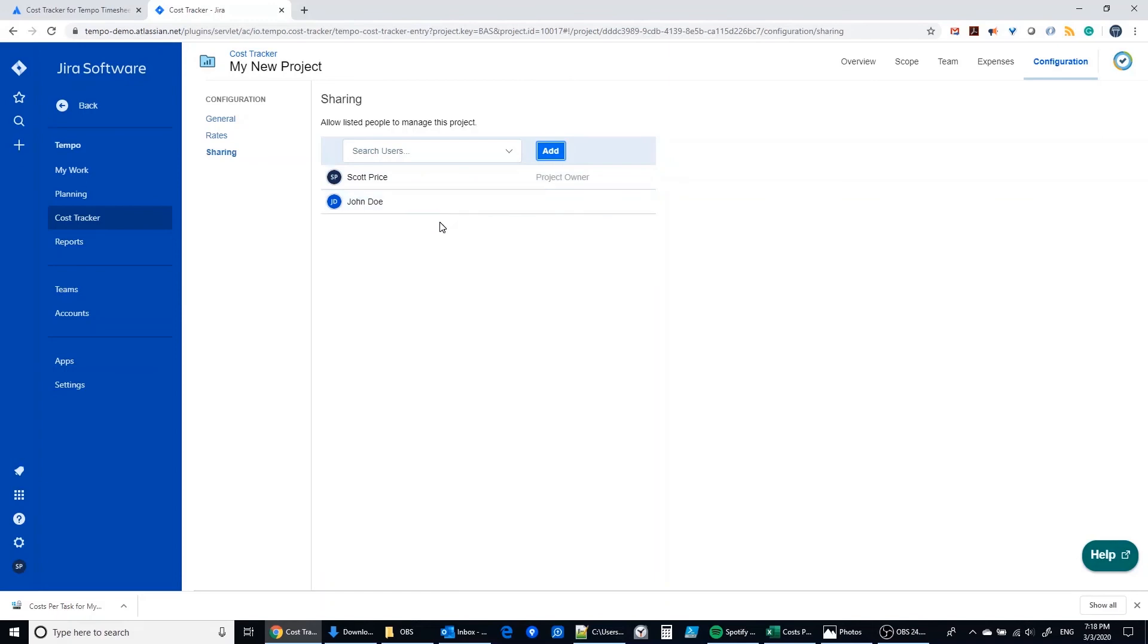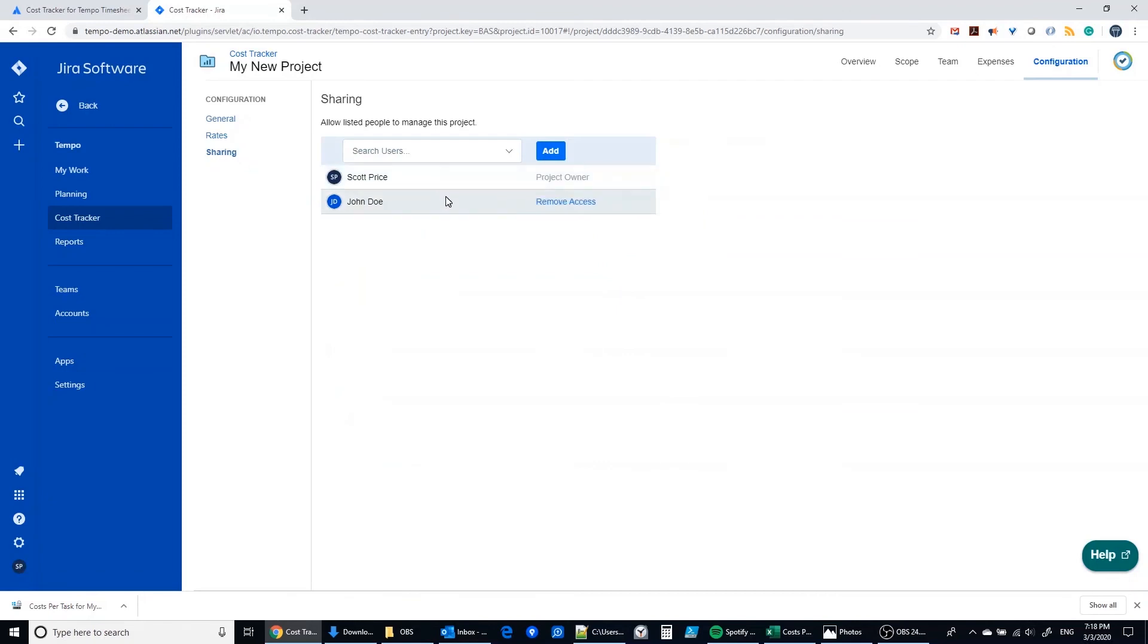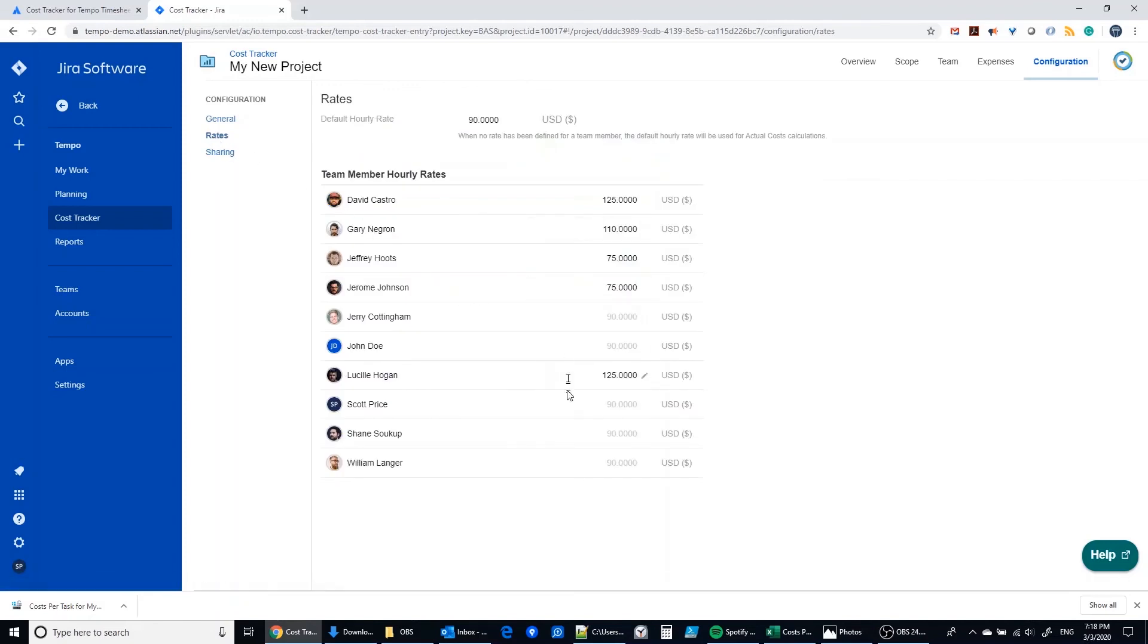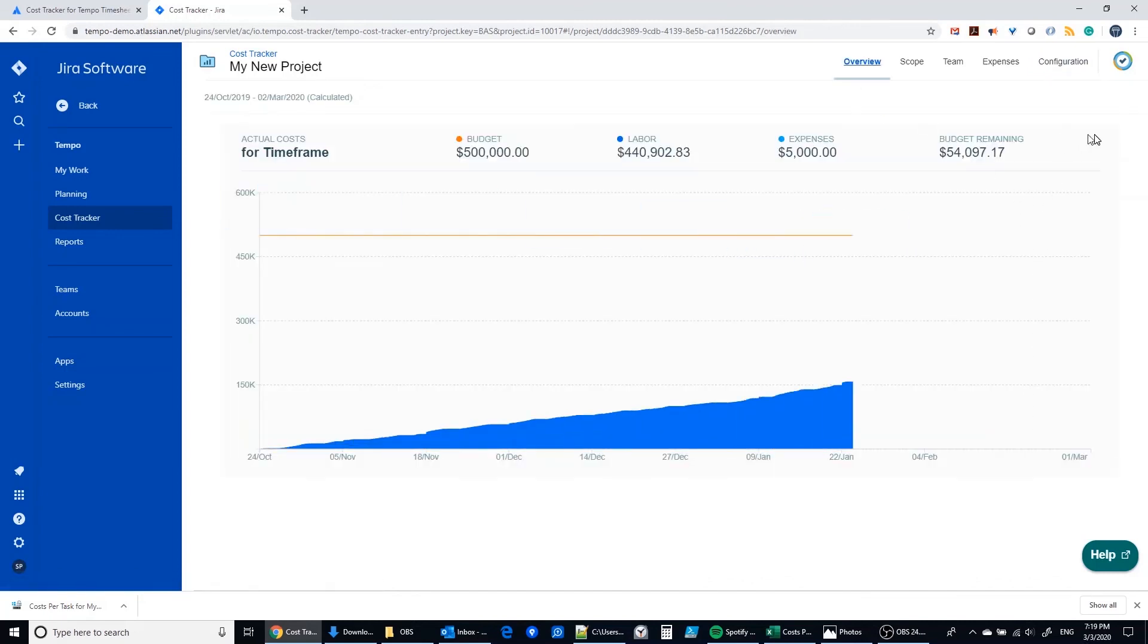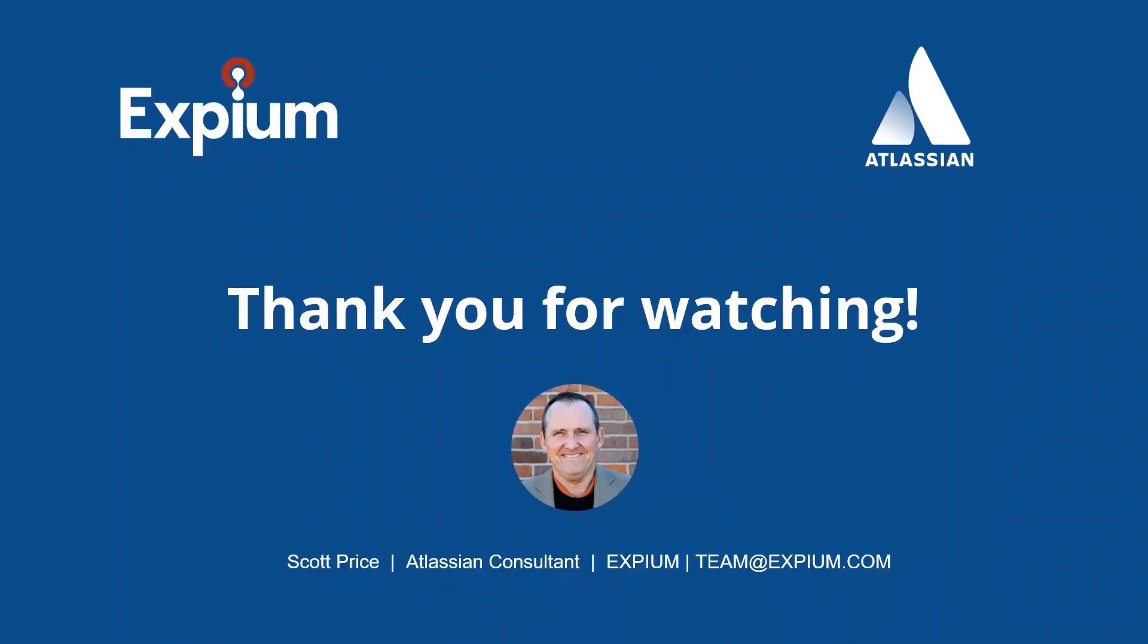The caveat here is that I cannot hide the rates section from John Doe. And so by virtue of adding them here in this configuration sharing section, I also am giving them access to the rates section. So I need be really cautious about this and only add people in this sharing section that I truly want to be participants with me in all the configuration. And so that's the caveat, but with that caveat this has the potential to be a really valuable simple tool to help companies track costs which are not obviously native in JIRA. Thanks for watching.